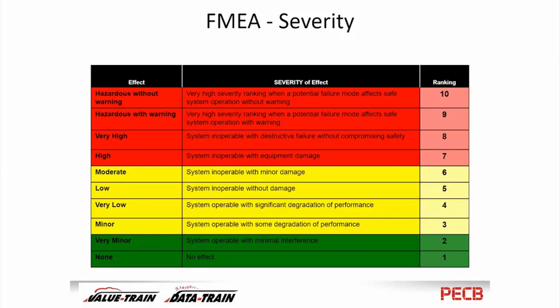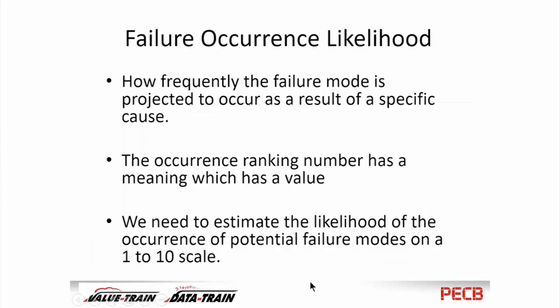So if we were saying, well, what could happen here? The pressure could get way too high. What's the effect of that happening? Unknown, unpredictable explosions and death, right? So that would certainly be a 10. I assume they didn't do that in this case.